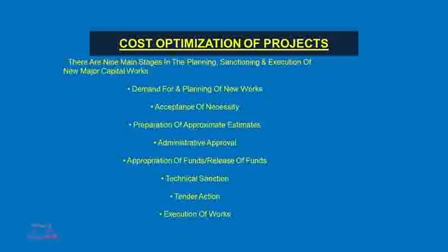First is demand for planning of new works. Second comes acceptance of necessity. Third, preparation of approximate estimate or rough indication of cost. Administrative approval, appropriation of fund or release of funds, technical sanction, tender action, and execution of works.